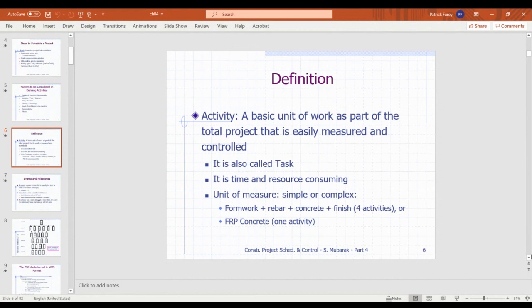So it's not that hard to look at all these active jobs. I take the schedules from all those active jobs and, in theory, overlay them. I take the man hours or man days from each of those four or five schedules, and I see that in two months from now we're going to have a requirement of 200 man days, and we only have enough tradespeople for 100. So that resource allocation is